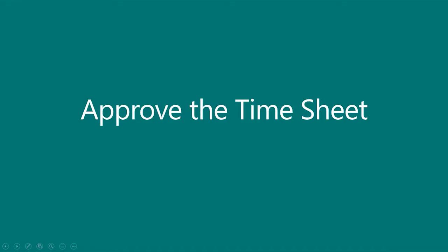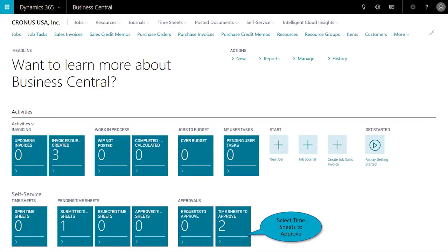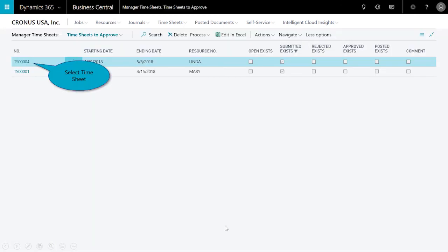Next, right, the on-site consultant has already submitted their time associated with a job and a specific task. The project manager then has the responsibility to approve their time, which in turn would trigger all the accounting policies to bill that client. So you see here too, first of all, there's no longer an open timesheet. You'll see the timesheets here. Now I have 2 to approve.